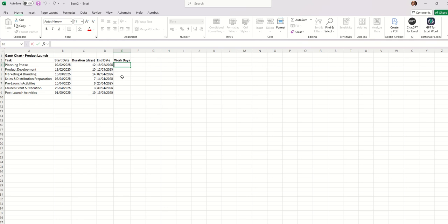That means that our actual duration, as far as this project is concerned, is going to be the difference between the end date and the start date. So instead of 12, we've got 16, taking into consideration the weekends, which were actually added.